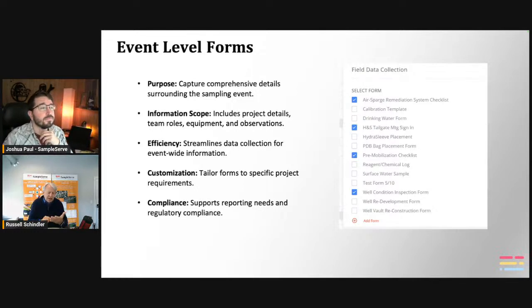I would go through the checklist just to make sure I didn't forget anything. And sure enough, if I thought I was so smart, this is a small project, I could skip the checklist, I would always forget something. I'd get to the site, 45 minutes away, and realize I left the groundwater water level meter tape on the garage floor and didn't put it in the vehicle. Inevitably, the checklist always helped.